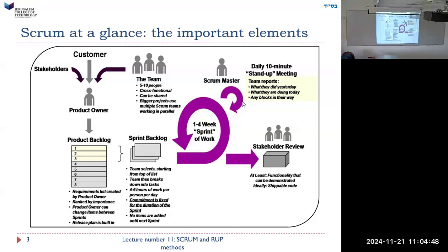And then during the 2 weeks of the sprint, there'll be a Scrum Master who will have a stand-up meeting for 10 minutes every morning, where he asks people what their progress is, what tasks they completed, what new tasks they want to do, and makes sure everybody is working together as a team. That's the basic organizational method of getting a product produced in a nutshell. Now, we'll go into more detail on all these things.